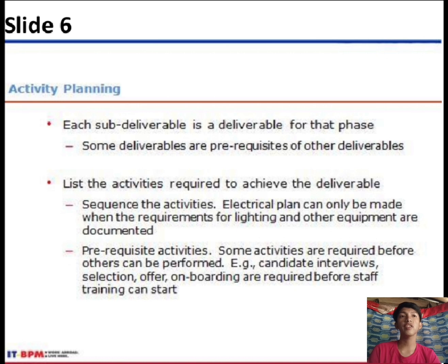So defining the activities involves identifying the deliverables at the lowest level in the WBS level 3, which is called the work package. So decompose work packages into smaller components called activities to provide a basis for estimating, scheduling, executing, monitoring, and controlling the project work. So documenting the work that is planned to be performed.